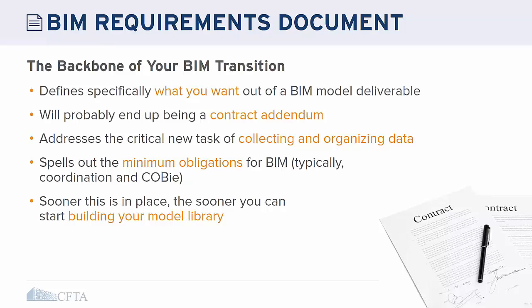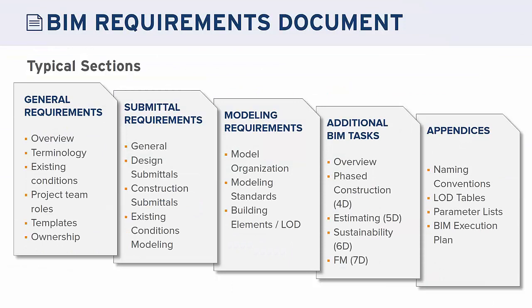The BIM requirements document is your overarching requirements, and it may not be pertinent on all projects, but all projects will refer back to it. For example, if I'm doing a small interior renovation, I may not need the section on how I expect roofs to be modeled — but that needs to be defined for other projects. Typically, the document is broken into sections, and every owner should have their own customized version rather than simply downloading another owner's document.